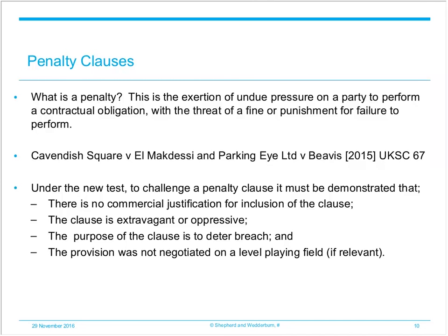In these cases, the Supreme Court held that if a simple liquidated damages clause in a construction contract includes a sum that a defaulting party can show is out of all proportion to the other party's legitimate interest, the defaulting party may seek to challenge the clause, and if successful, that clause would be unenforceable.